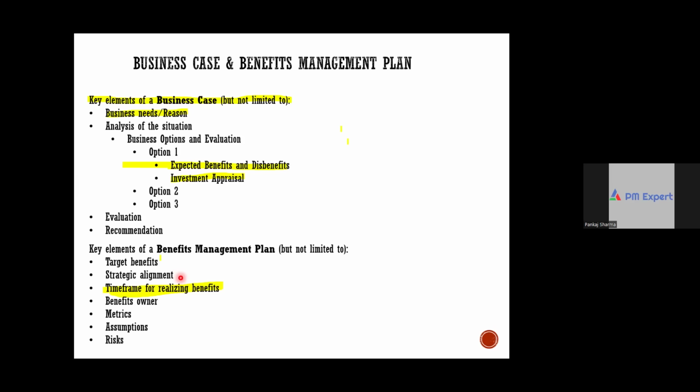The project should be aligned to the overall goals of the organization. Tell me, will you do a project if it is not aligned with the overall goals of the organization? No, you will not be doing it. For example, if the overall strategy of an organization is to cater only to high-end, niche customers, then any initiative or project to build a cheaper product will not be aligned to the overall strategy. Yes or no?